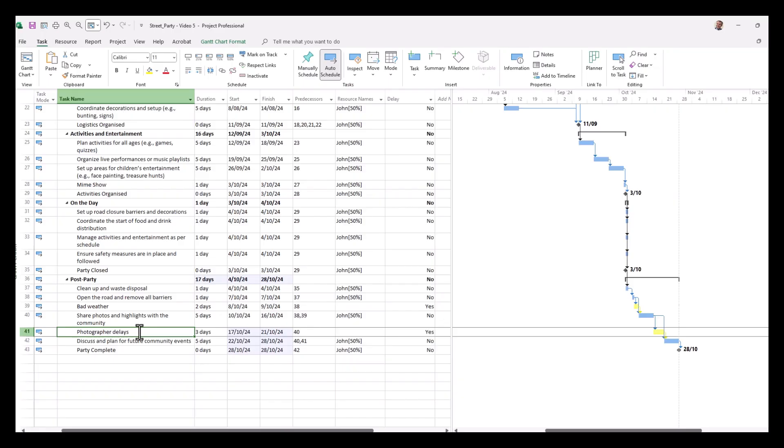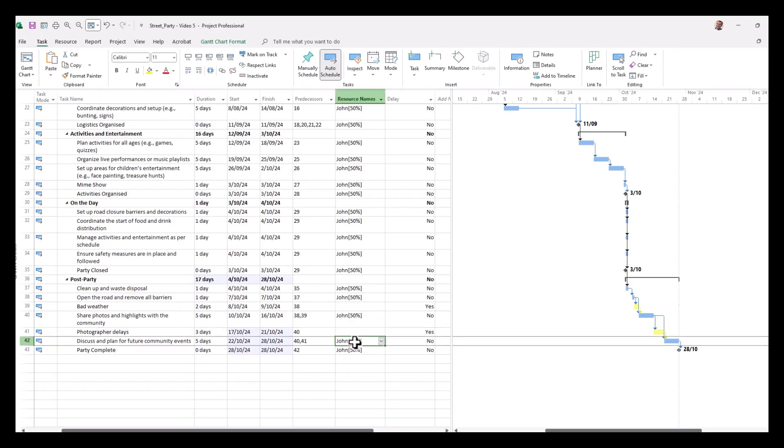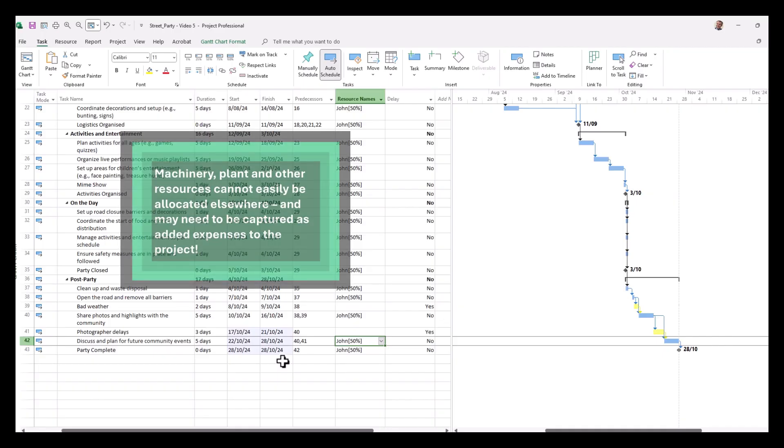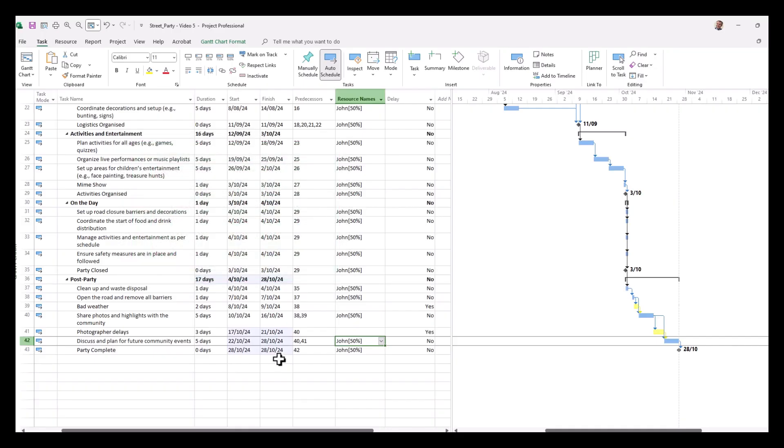Now wouldn't it be good if we could also demonstrate the cost involved in some of these delays. Now you can see, just for example, we have John working mostly on this project. Now a lot of the times we'll be able to reallocate resources elsewhere as a project manager to other projects, but sometimes we can't. We might be involved in a large project where we have machinery and plant on site and they can't be redeployed elsewhere, so the cost is that those sorts of resources remain idle which is a cost of the project.